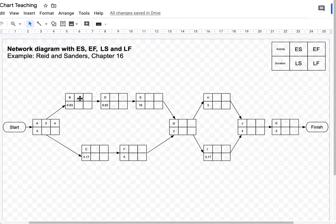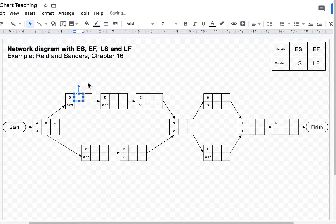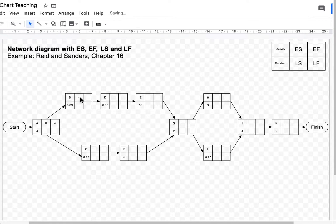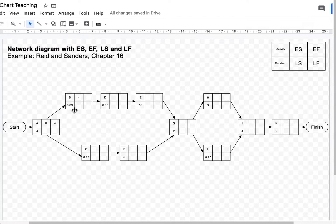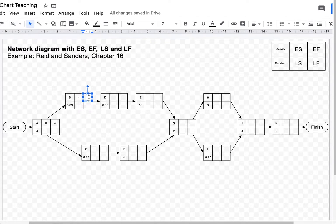And I'm going to take that to B. So I'm going to write 4 there. Activity B, the duration of it is 6.83. So if I add up 4 plus 6.83, that's 10.83.